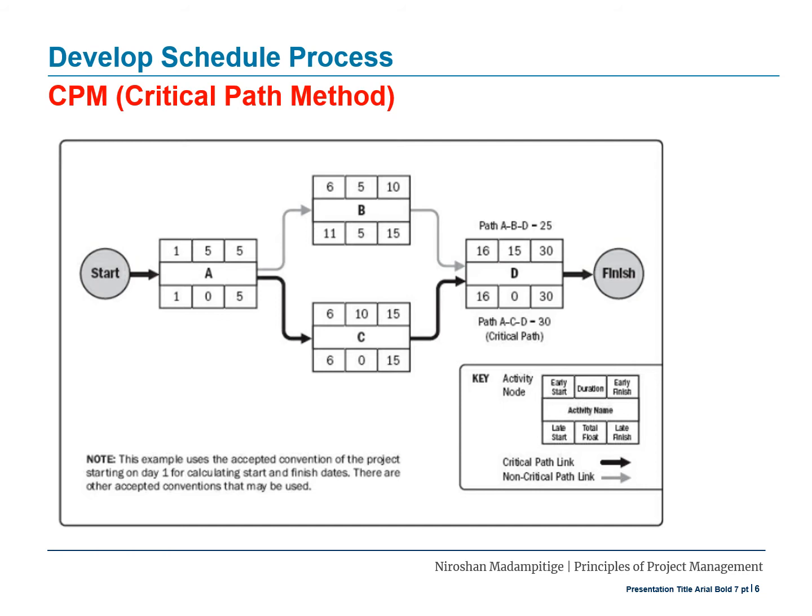On any network path, the total float or the schedule flexibility is measured by the amount of time that its scheduled activity can be delayed or extended from its early start date without delaying the project finish date or violating a schedule constraint. A critical path is normally characterized by zero total float on the critical path.